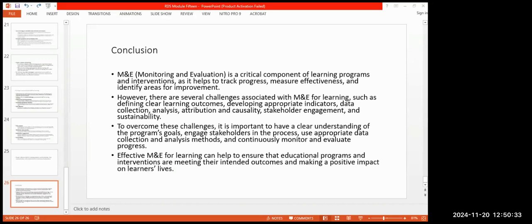We agreed that a problem is what informs the start of a project, and that a project can be planned through development of a logical framework, which helps in identifying and clarifying. Once a problem is clear, then you're able to identify the objective, the activities, and the outcomes, and all those are logically captured in the logical framework as a summary of the project.